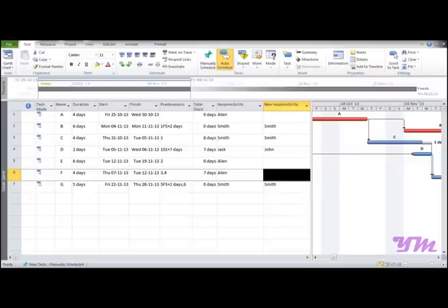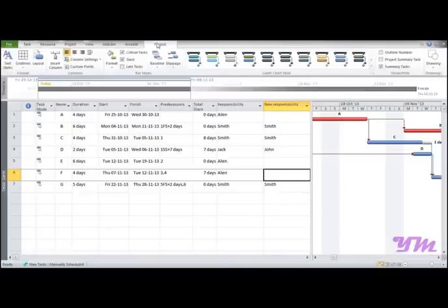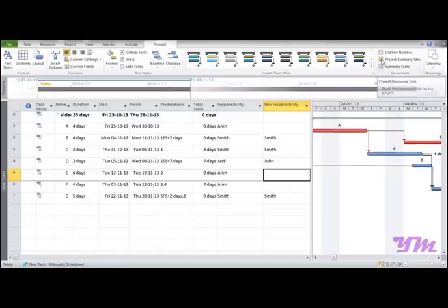So for that, first of all, let's begin with how to insert the summary for the whole project. As on the screen you can see this is the project, and if you want to know for how many days the project keeps on going, then you need to sum up all these days. Microsoft Project itself can do it and display it on the very first row of this table. To do that, go on to format, and click on project summary task over here. It shows the summary task for the project, so click on it.